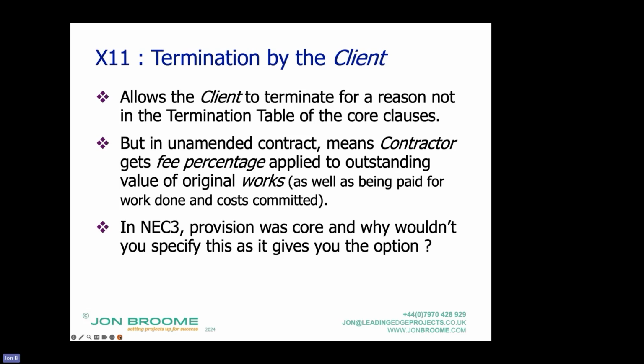And if it was because the contractor was really awful and you followed the right procedure, and you got another contractor in, they would effectively pay the extra costs. On the other hand, if you were throwing good money after bad and just decided to terminate the contract because it was no longer viable as a project, nothing to do with the contractor's performance, the contractor got paid their fee percentage on the remainder of the outstanding work for the original prices.